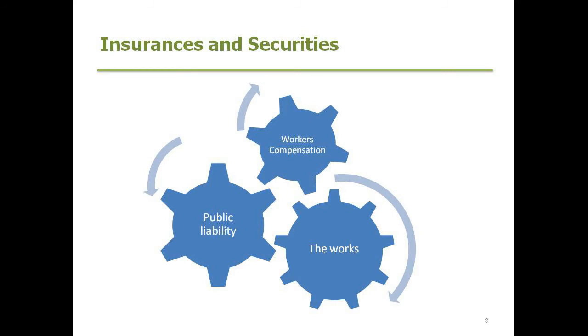Public liability also, covering the injury and the possibility of a workplace member or someone walking onto a site. And remember, the builder has sole possession of the building site, so making sure that there's adequate cover there for public liability. The same again with workers' compensation, that all employees of the builders would have a right to claim up the hierarchical tree if there's no workers' compensation or some other form of income protection insurance.